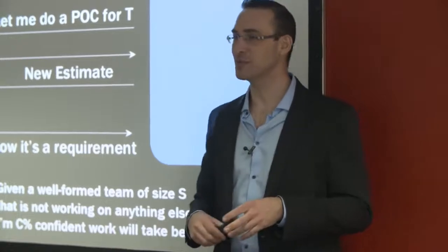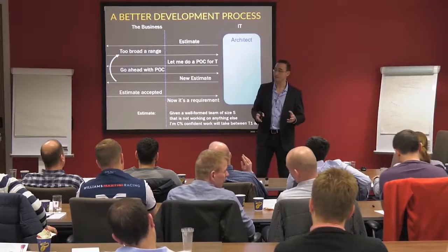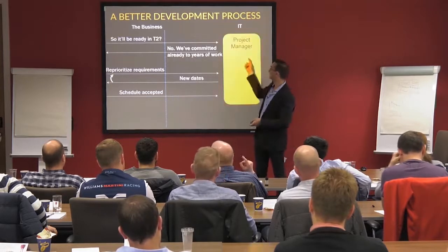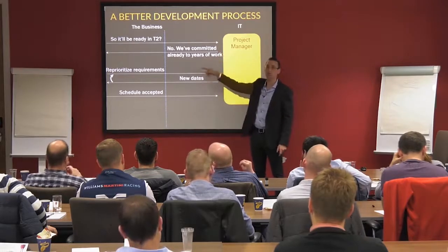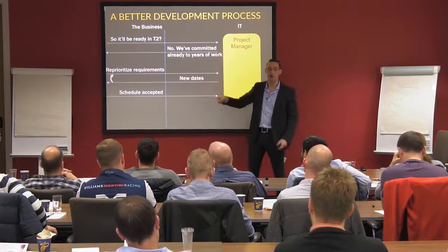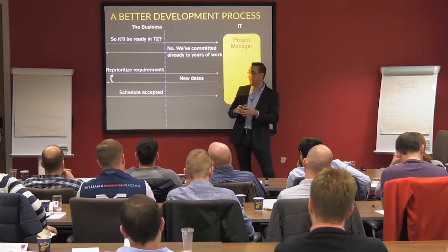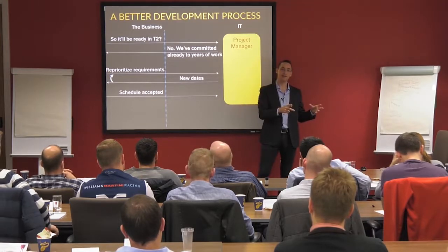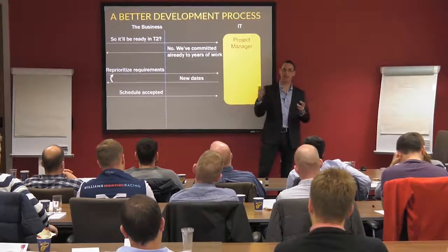At which point the business will throw a fit and say, that's totally unacceptable. You say, great, because now I have somebody else for you to talk to. Say, no. You're going to have to reprioritize those requirements. You're going to have to figure out, if you want this thing earlier, what other things are you going to push later? Because ultimately, our assumption is a well-formed team not working on anything else. So if you want this thing done sooner, something else is going to have to give.